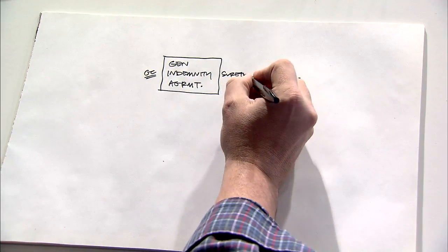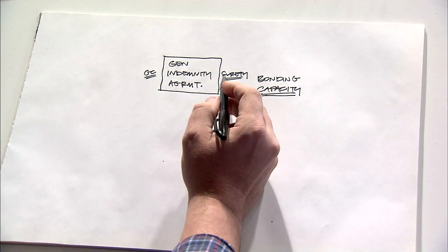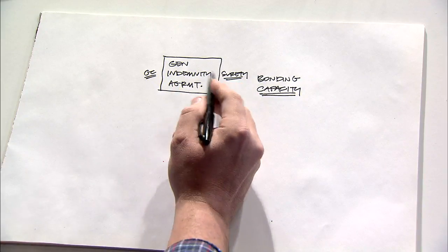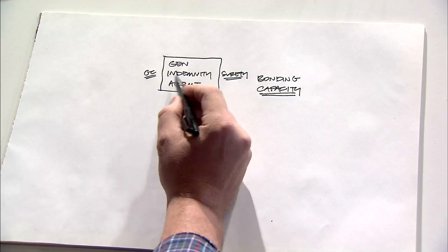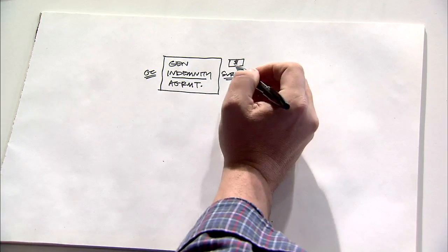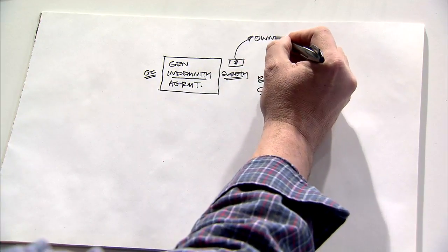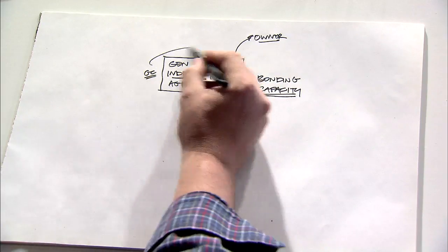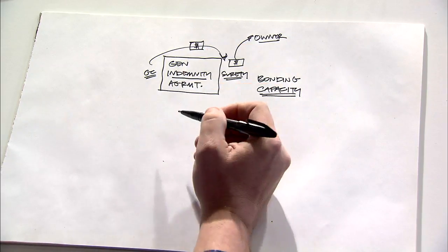This establishes the basic relationship in that the surety will consider writing bonds for the contractor, and the contractor agrees to indemnify the surety, which means that if the surety has to pay money on the contractor's behalf to an owner or others, the contractor would have to pay them back.